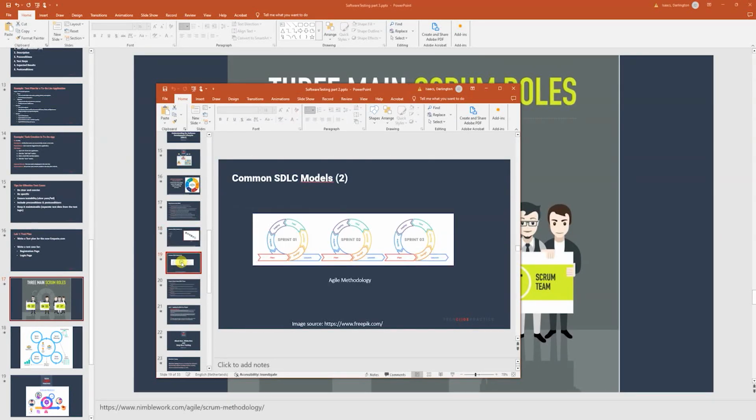Agile takes the project, breaks it down into little parts, works on those little parts as features, and keeps iterating. So that's why you see something like this. Agile takes that big project and breaks it down into sprints. Sprints are mostly a two-week time frame, and in that time they design it, develop it, test it, deploy it to production, and then they go again.